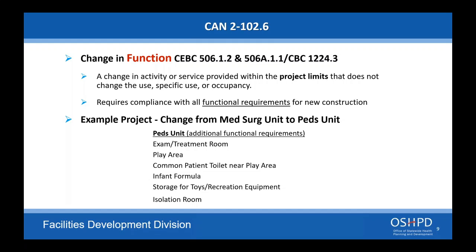Richard, is a re-roofing project considered a project or just cosmetic? Re-roofing is a project. There are expedited permits for small ones, I think under 400 square feet, like patching a roof, but a re-roof project would be considered a project. We're actually going to be submitting an expedited permit package for re-roofing for skilled nursing facilities, but a lot of the tips in there can be used to apply to regular projects. But yes, re-roofing is a project because there are other things to be looked at rather than just the material going down.